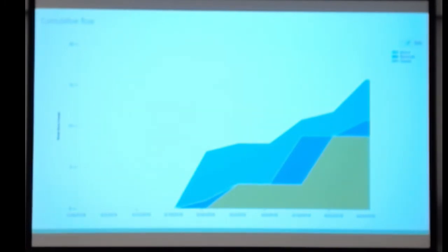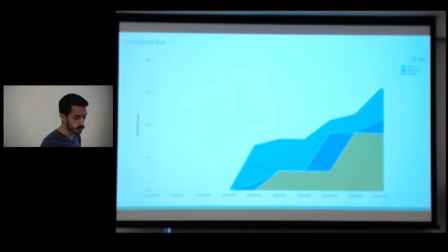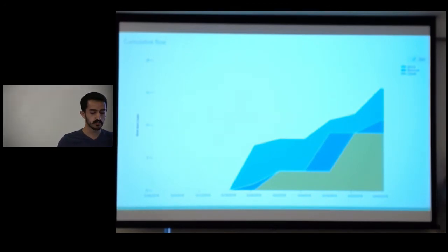This graph shows that the green color shows the cumulative flow. The green color means the closed stories. The dark blue represents the resolved stories, and the light blue represents the active stories. Each green peak is an end of a sprint. The dark blue is stories marked as resolved and should finish off the green peaks. This graph is meant to show how stories are created, and how stories are closed versus how they are open and active.